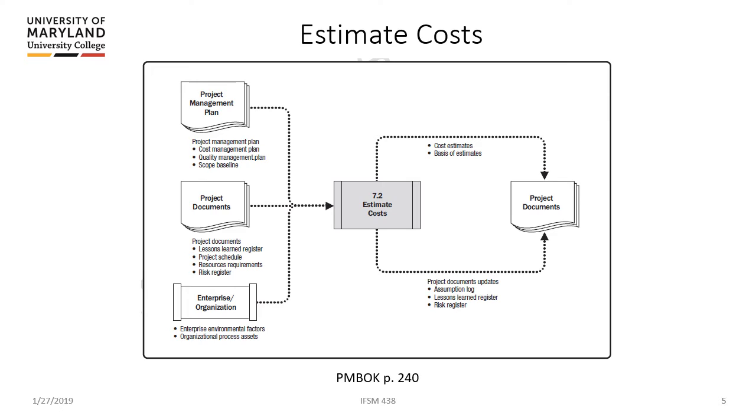So the big thing we start with is our schedule, and we look at each activity, and then we have to make an estimate, which is really challenging depending on your skill level and how unique this project is. If it's very similar to projects that your organization or you have done in the past, then you have a good understanding from the past to estimate cost. If it's brand new and it's unknown territory, then estimating costs can sometimes be very challenging, and we're going to look at how we go about doing those. But estimating costs is really big, and then we're going to later on see how well we did with our estimates when we actually start monitoring and managing the outcome.